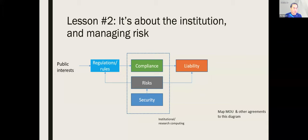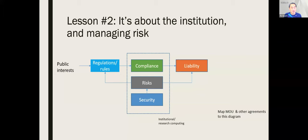Another key lesson we learned through the Accord effort: getting Accord to the point where we could offer service within UVA and with external users, we had to go through stakeholders we didn't think were involved — including insurance, for example. One of the things Ron and I still bear the scars for is that it's all about the institution. We work within the institution, and if we don't make the institution happy, nothing's going to happen. And when it comes to the institution, it's all about managing risk.